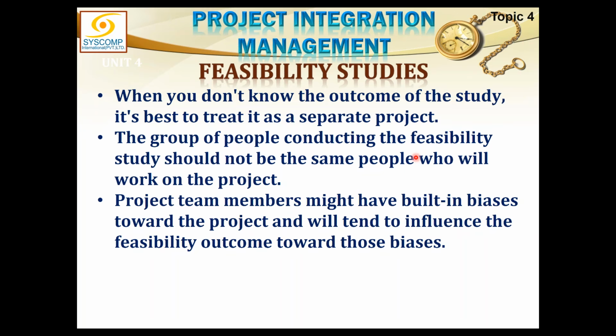But at the same time, is it wise to use the same person who did the feasibility to be put as the head of the project? This person who is creating the feasibility is supposedly biased. He is a biased person because he created that feasibility, and he is set out to prove whatever he has found in the feasibility to be true. So he will miss out the facts. He will force himself to those results which were proven in the feasibility.